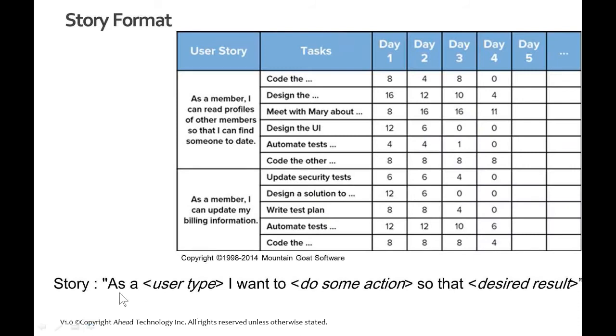Just a little bit more on stories. I wanted to share that everything in our product backlog and sprint backlog, what we work on, even stuck as index cards up on a visual Kanban board in the Scrum room, is the user story. And it's always in the same structure: as a user type, I want to do some action so that I achieve a desired response. Really, really practical to be able to continue to deliver that value and keep it customer focused.